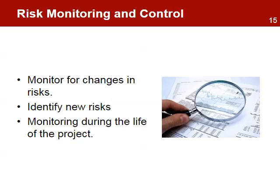Continuous monitoring by the project manager and the project team ensures that new and changing risks are detected and managed, and that the risk response actions are implemented and are effective. Due to its probabilistic nature, risk can and will change in levels of probability and impact. As more information is obtained, there is a better understanding of the risks identified in the early stages of the project. The project manager should seek to update the original risk register on a regular basis, especially when the project has identified many risks. Risk monitoring continues for the life of the project.